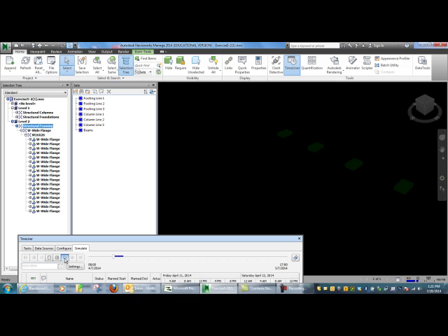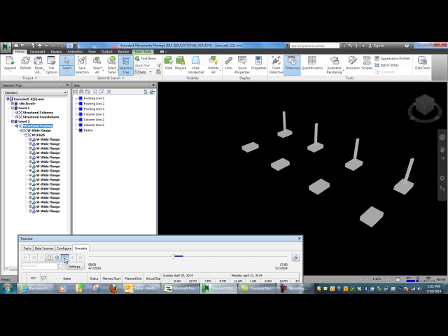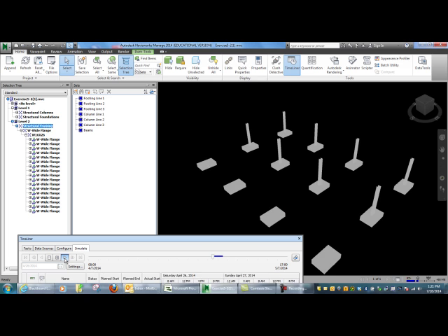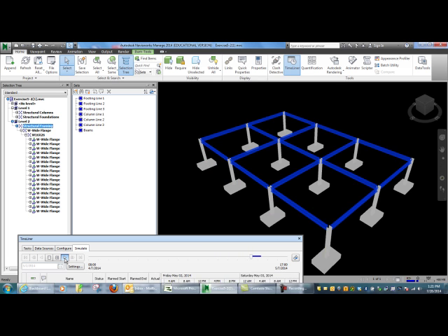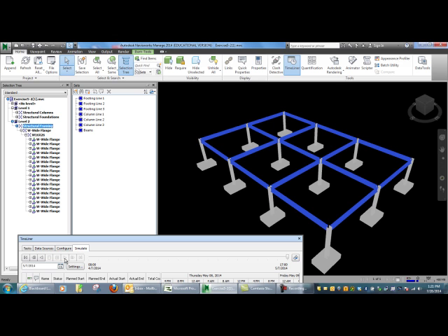So the only thing that really seems illogical here is the columns are built, now you move on to the second line of footings, now the second columns are built, now you move on to the third row of footings. And that's probably not really the way it would work. I mean, you can stagger footings, of course, but it seems like you'd probably be building those second row of footings maybe at the same time the first line of columns are showing up.